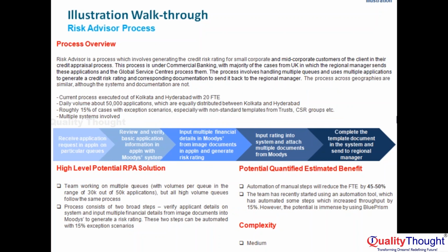So for data collection, you need to mainly explain two things: SIPOC approach, supplier, input, process, output, customer, and the data collection template. These are the two things we need to capture. This is the discovery phase. Even the discovery phase is not 100% completed. Some estimations are pending. Those estimations I will cover in the coming classes. So if your client asks you to automate by using RPA, first you send your data collection template to the client, ask them to fill it, or you have to fill it.